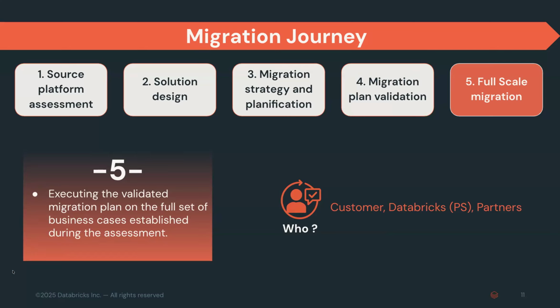Of course, this phase also implies validation and user acceptance testing from the customer, but this is rather an execution phase where, to be honest, our engagement is not that intense. Typically, during this phase, we may provide oversight and governance support, but if all the previous phases were planned correctly, you probably won't need too much professional services support during full-scale migration.